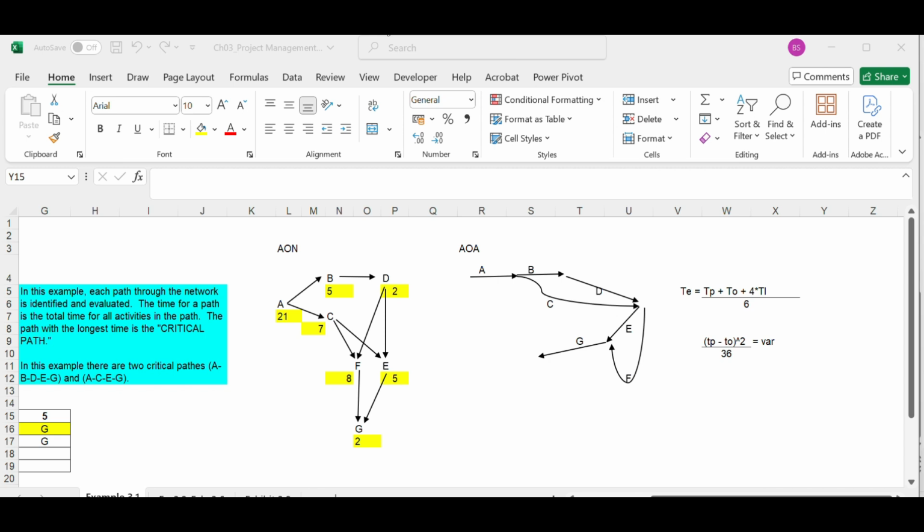As the planning horizon increases, uncertainty increases, and the accuracy of estimation goes down. That is, the longer the duration of estimation, the time horizon increases and the accuracy decreases. The accuracy of estimate depends on the type of estimate. Factors influencing estimation include planning horizon, project duration, people, nature of the project, structure of the organization, culture, etc.